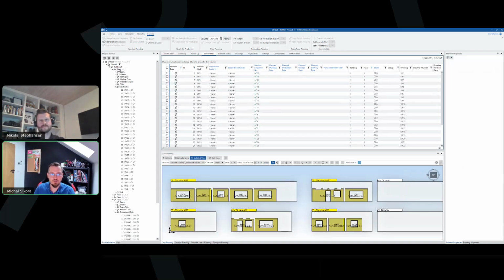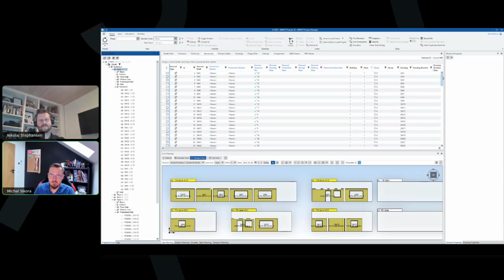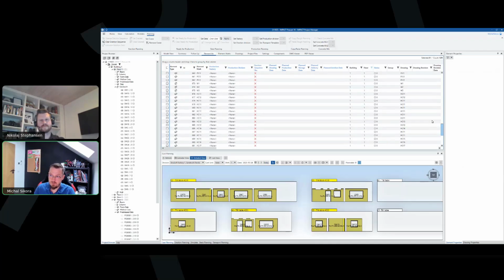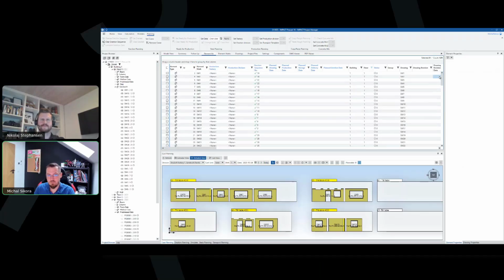If I go click on floor number 1, then that selection is gonna go bigger. And you see some red X's here and some green ticks with some numbers there. That's the erection sequence that we actually have assigned before to the elements. So immediately you have a preview here, whether you actually assign an erection sequence to the elements or not. Erection sequence also matters at some other stages in the planning process, because maybe you want to include that erection sequence in your transport planning.